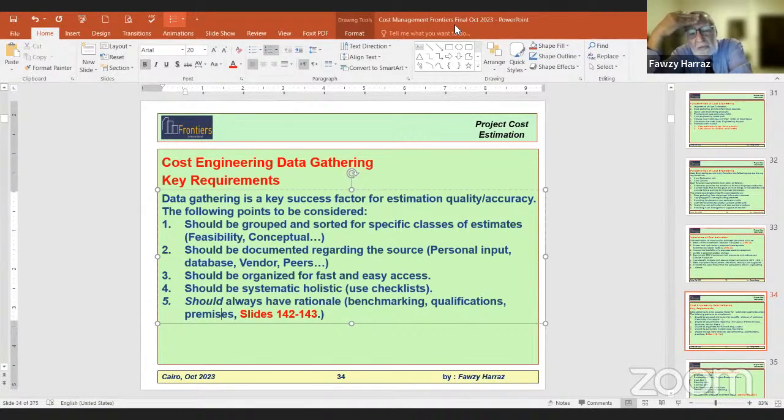So normally during the bid process, any clarifications or such notifications from a bidder are shared with the other bidders to ensure that the bids at the end are fully aligned regarding the scope, specs, and the price, to make the comparison fair. So this is one way I gave you. I try to be ethical, but sometimes we have the debate.